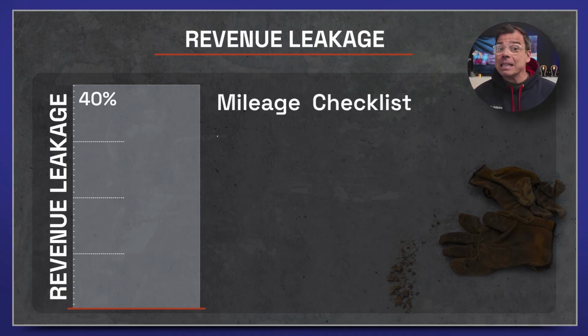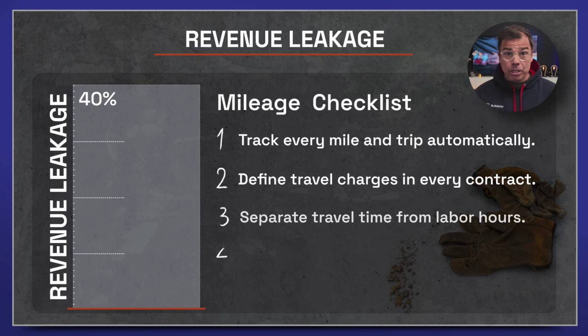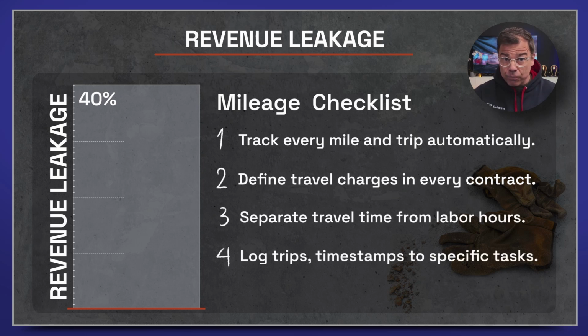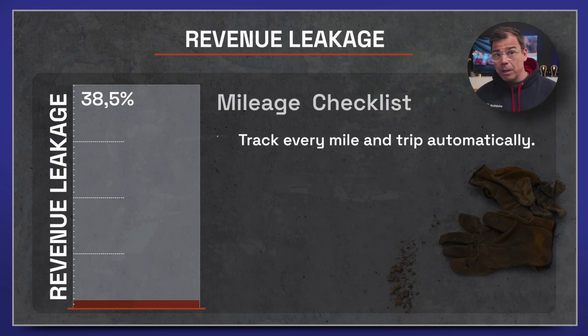First up on the list is unbilled mileage. Here you have 2 cost items. Firstly, the time you spent driving that you could have invoiced for, and of course, the actual cost of operating a motor vehicle. Just by making sure you invoice for the time you or your crew member sits behind the wheel can easily increase your billing rate by 1 to 2%. Doesn't sound like a lot of money, but you should always include mileage in your invoice, because if you don't, it will eat into your profitability.